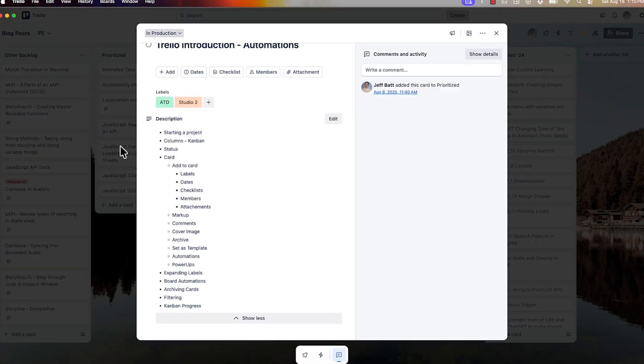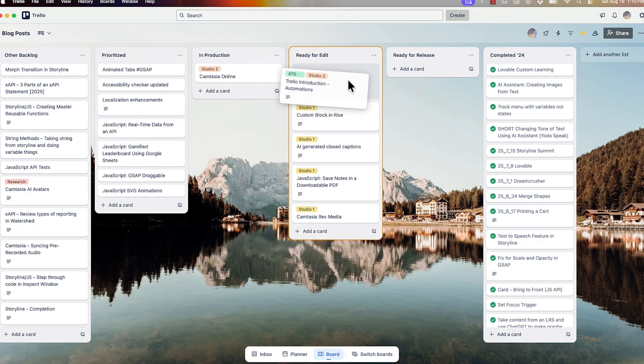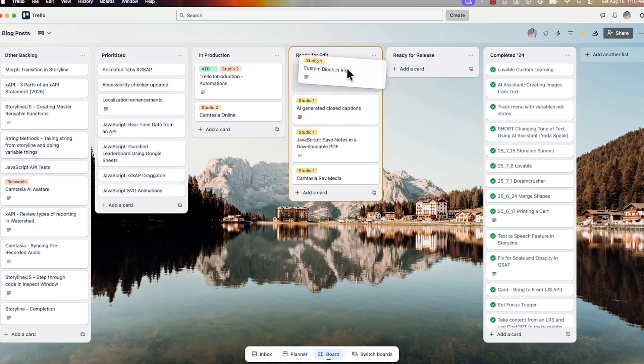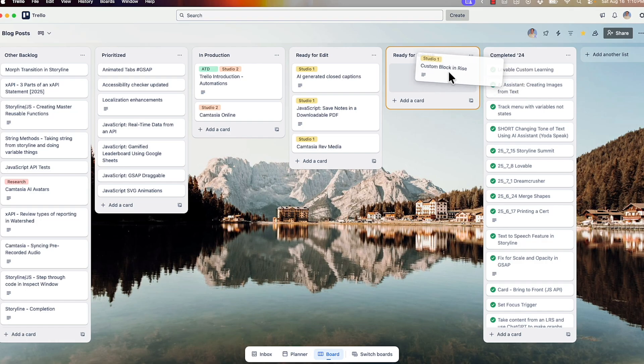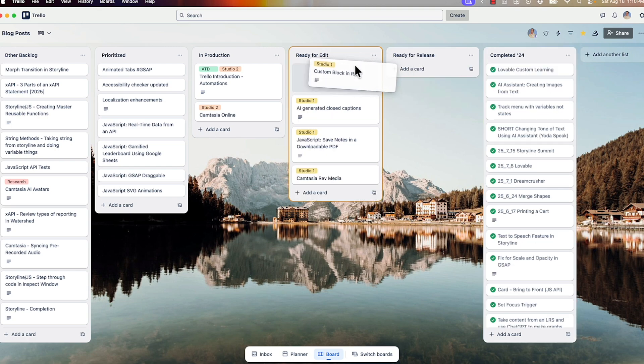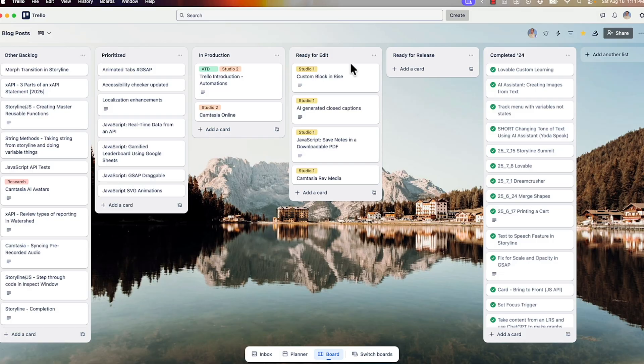Inside production, I map out exactly what I want to cover. Once it's ready to edit, I just move it over to ready to edit and prioritize by dragging cards up and down. Once a video is edited, I go to ready to release. Once a video is completed and published to YouTube, I move it over to completed. If you hover over it, there is a mark-complete option — and you can see that's what creates the checkbox there. This lets me keep track of all these different projects and videos in different statuses.